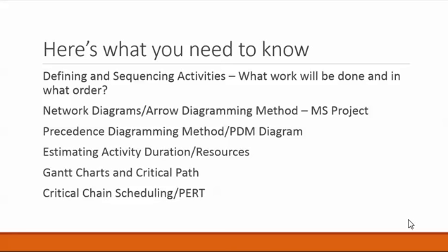That's the decomposing part. And sequencing, of course, gets into, well, I can't go and create the website. I can't go forth and populate data in the website unless I have first created the website, created the web page.